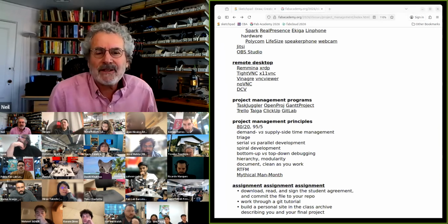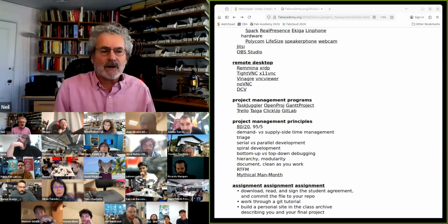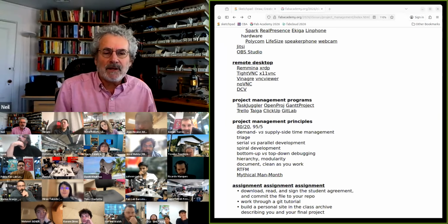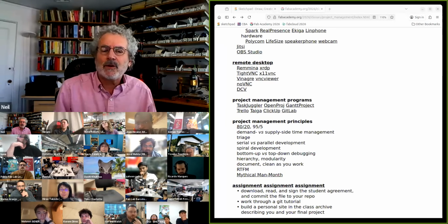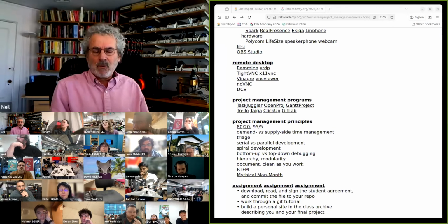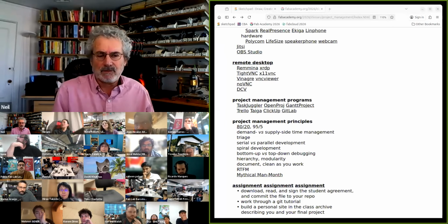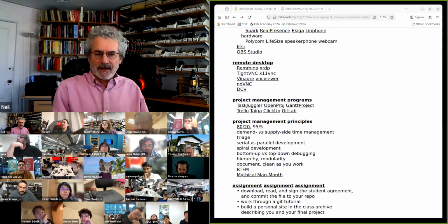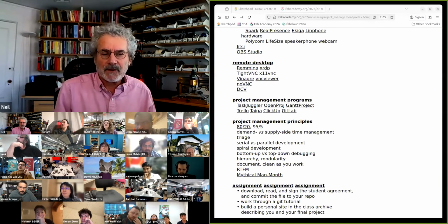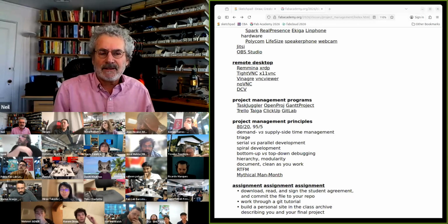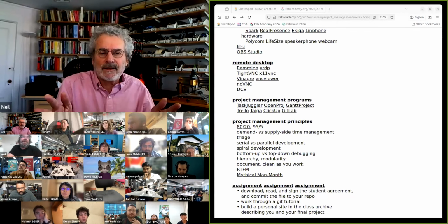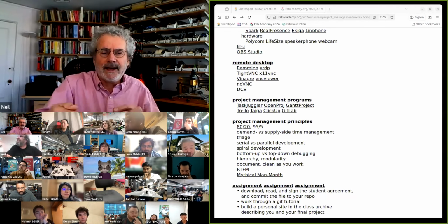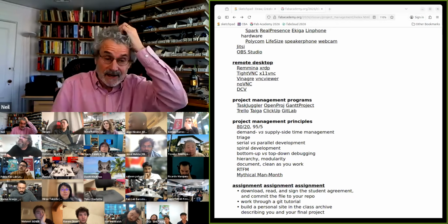So after today's class, you can start reading Git, you can start web development. But what you should do is realize a week from now, you need a website. So you can afford one day on Git, one day on HTML codes, one day on choosing an editor, one day to prototype the site, one day to refine the site. You make a schedule in advance, and to a surprising extent, you can learn to work to that. So you need to work to the schedule of the time, not work to the task. And you fit the task into the time.